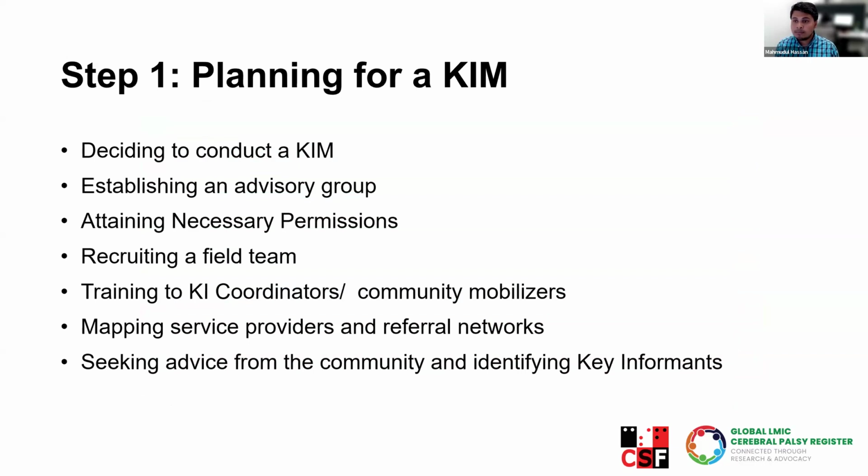Once we have answers to these questions, then we'll have to establish an advisory group. This advisory group should include policymakers, researchers, DPOs, local NGOs, and community stakeholders. After establishing the advisory group, we'll have to attain necessary permissions like ethics approval or local government approvals.